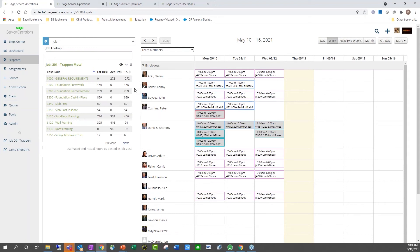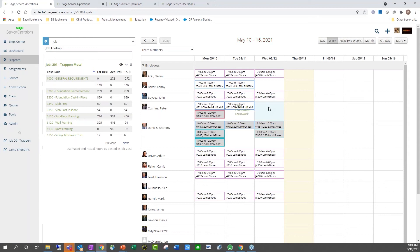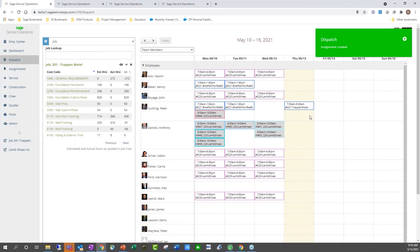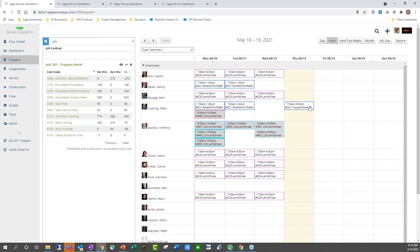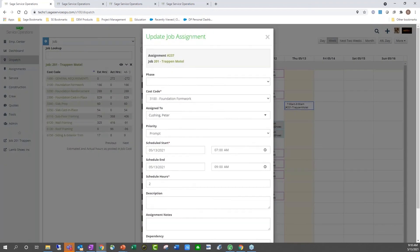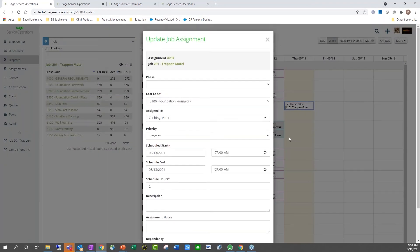I can also use these cost codes to drag and drop onto a particular person's schedule. So if I wanted to put the foundation framework for the Trap and Motel on Peter's schedule for Wednesday or for today, I can simply drag and drop that onto his schedule. I can also move this around once it's been placed on the resource scheduler, or open it up and change some of the information if needed.